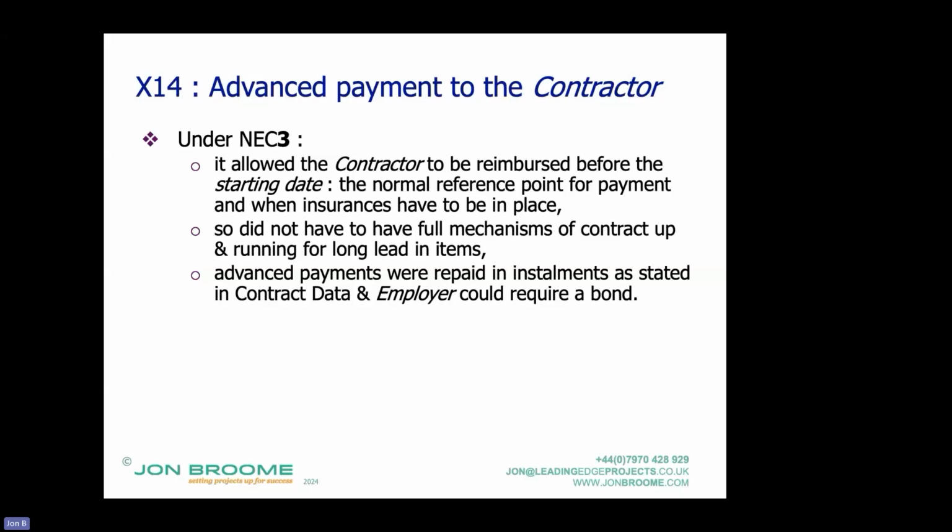They've shown their insurances are for doing the work, including design, and so on. Payment mechanisms are up and running. A lot of the costs have to be incurred within the working areas or the site. This allowed the contractor to say, I don't need to mobilise all of that. You, the client, don't need to mobilise all of that. Just make an advance payment for this deposit.